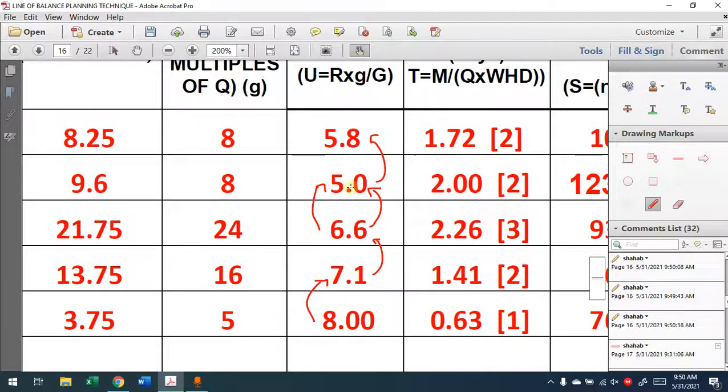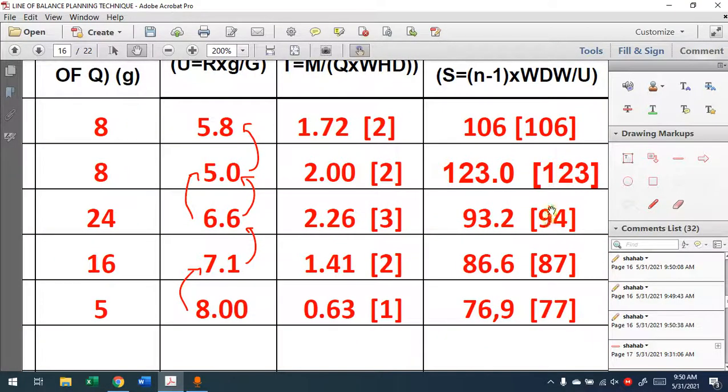You will add to the top, then you will use these 94 days to find the first unit's start date. Here, 7.1. It's bigger than this one, yes? We'll add it to the top because we directly know that if I add to the top, I don't have any problem. 8 is more than 7. I will add to the top. So you will see it now. For the rest of them, I will add to the top and I will have no problem at the bottom. I'll have a minimum of 2 days at the bottom, at the starting unit.